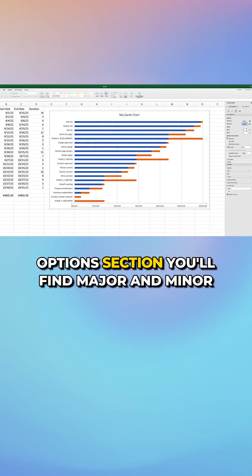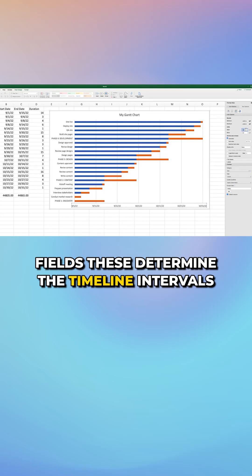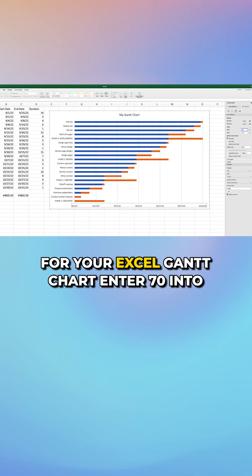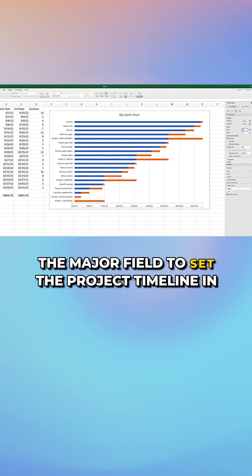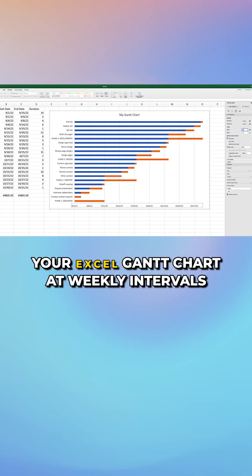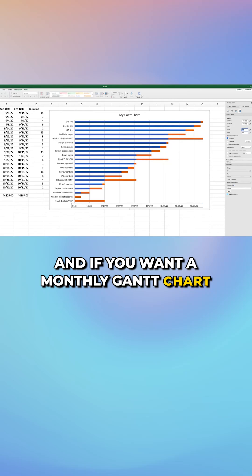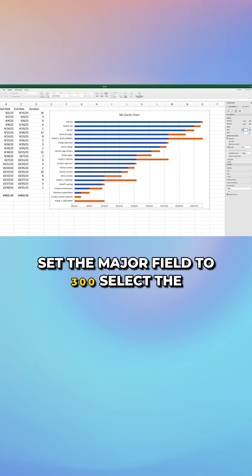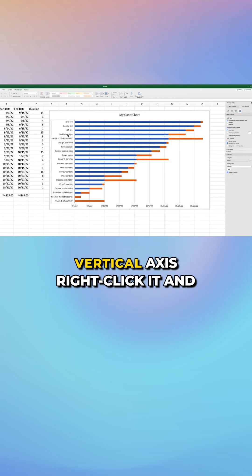Under units in the axis options section, you'll find major and minor fields. These determine the timeline intervals for your Excel Gantt chart. Enter 7.0 into the major field to set the project timeline in your Excel Gantt chart at weekly intervals. And if you want a monthly Gantt chart, set the major field to 30.0.